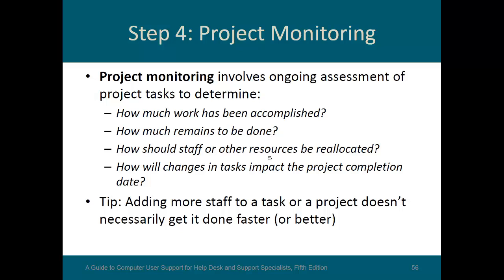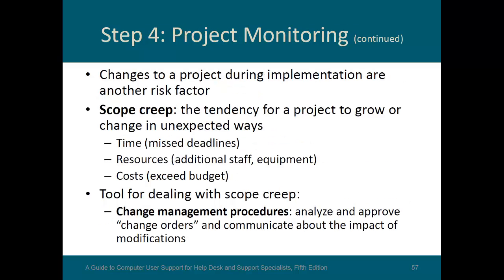So adding more staff to a task or a project doesn't necessarily get it done faster or better. You may end up with too many cooks spoiling that soup. Changes to a project during implementation are another risk factor.